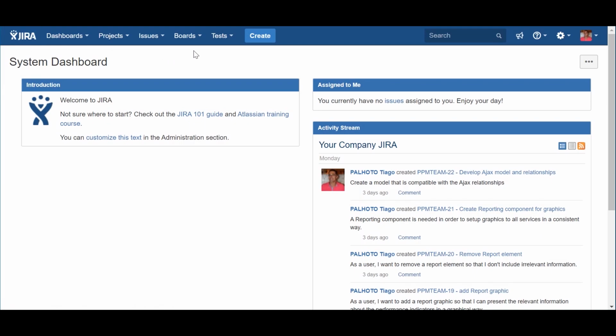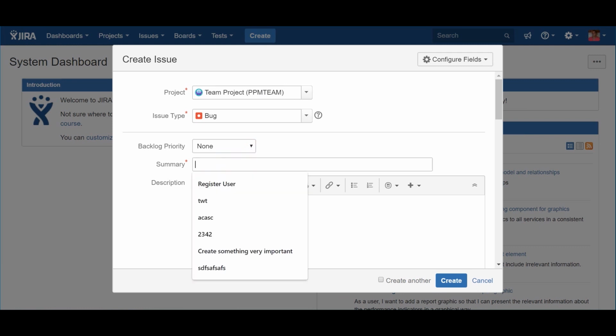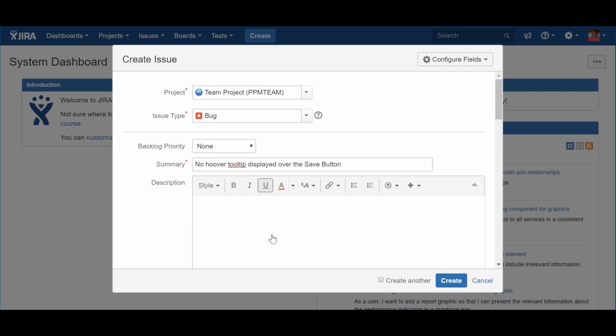Let's now take a look at the bug. When it comes to the backlog, the bug is treated in the exact same way as a story or an enabler story, making it quite normal that they share several attributes: story points, backlog priority, or the inevitable acceptance criteria have the exact same logic as when applied to the user story. Yes, the acceptance criteria. After all, it's only when it's fully verified that the item can be a candidate to be considered done. The attribute description will be used freely to describe the problem found.